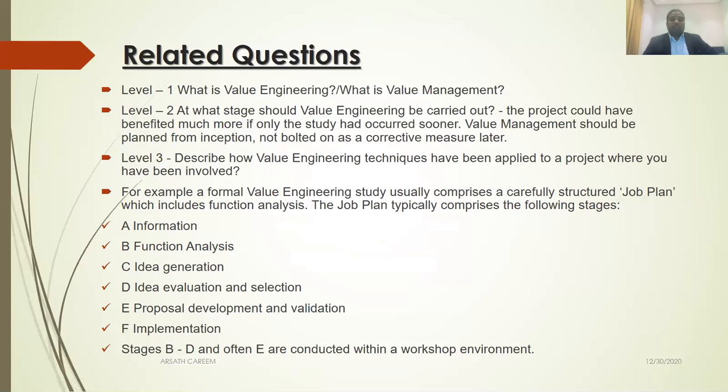Related questions directly on value engineering: what is value engineering? What is value management? At level 2, they may ask at what stage value engineering should be carried out. The project could have benefited much more if the study had occurred sooner. Value management should be planned from inception, not bolted on as a corrective measure later. For a level 3 question: describe how value engineering techniques have been applied to a project where you have been involved. So you have to give an example where you were involved with value engineering.